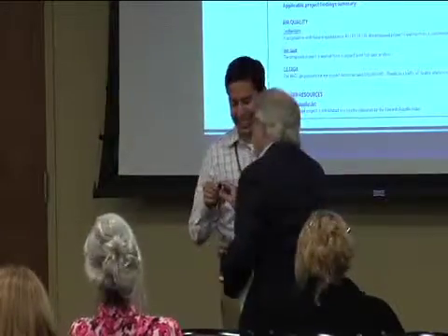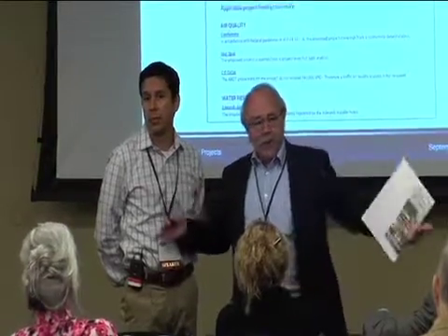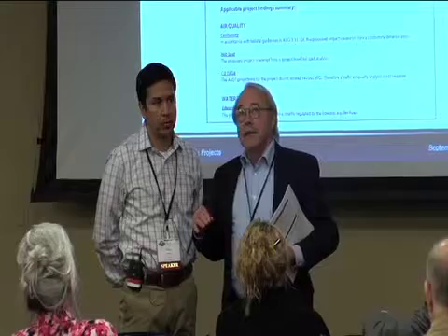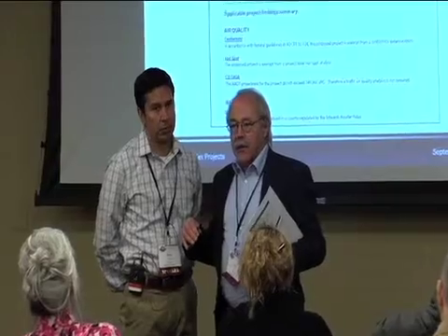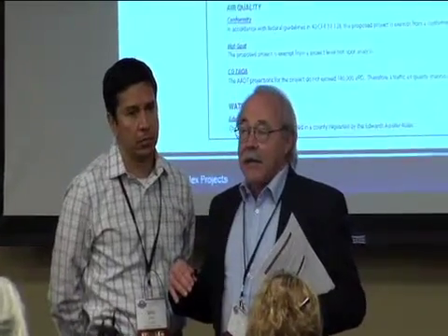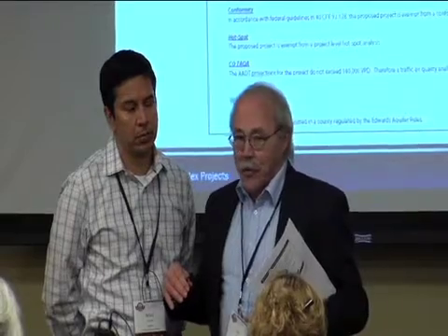Sure. Okay. The question is, would we elaborate on something that is now called the open-ended D categorical exclusion? The opening paragraph to subsection D in the federal reg says the following list of 11 projects are examples of categorical exclusions. So the opening paragraph allows for an including but not limited to use of the categorical exclusion. Open-ended D list approval authority is the name that FHWA lawyers give to that approval authority that's contained in that paragraph.